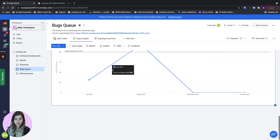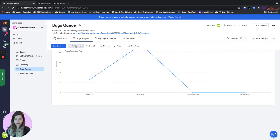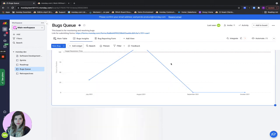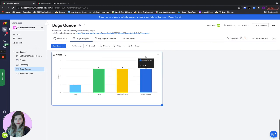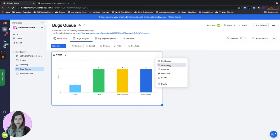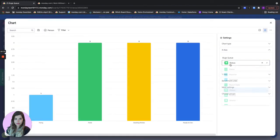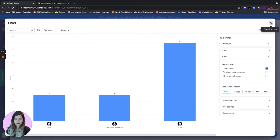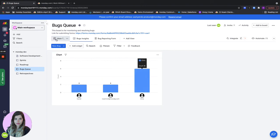Let's say I want to also add a chart that shows me how many bugs are assigned per developer. I want to see my team's capacity. I'll go here, I'll add a chart, I'll go into the settings and I will choose the x-axis to show me the developer and the y-axis to show me a count of all the items, all of my different bugs. Now I see how many bugs each of my team members has assigned to them.